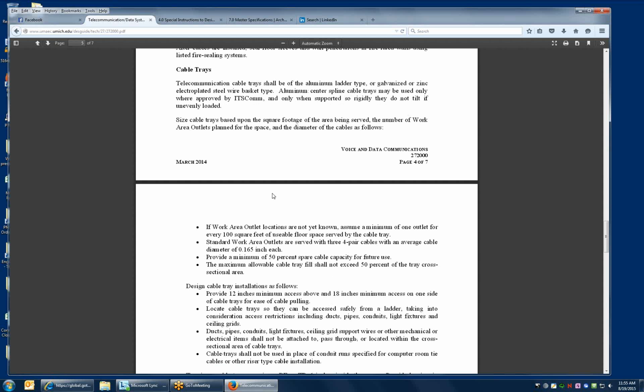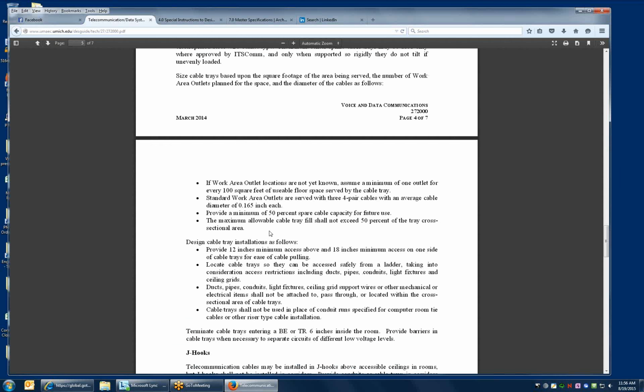You can tell facilities went through with somebody and said, Bob, what do you need? And he says, I need a computer here, here, and here. And Mike, what do you need? Well, I need a computer here, here, and here. So they got 6 triangles on the drawing. Well, 6 triangles on the drawing for me is 18 cables, 3 apiece. So we've got 15 outlets in there, 3 cables apiece, and then I go back a month later when it's open and nothing's being used. So we need a matrix for the work areas and stuff like that.